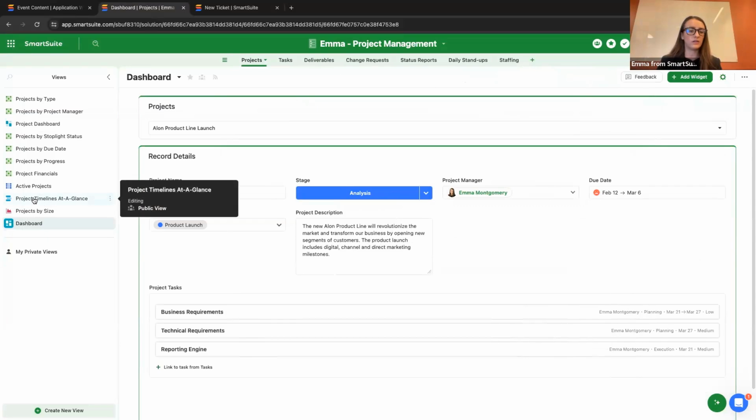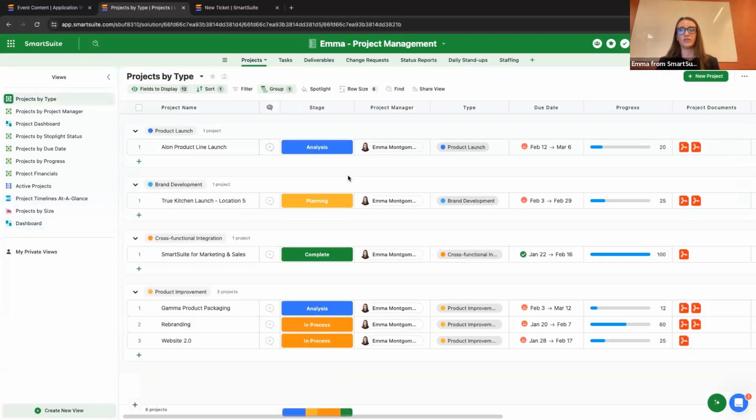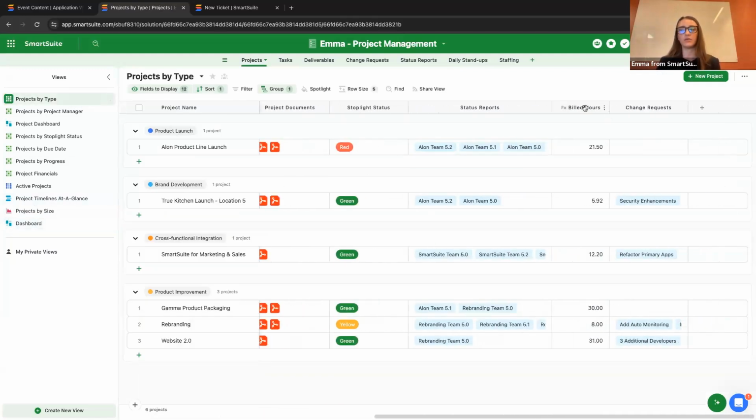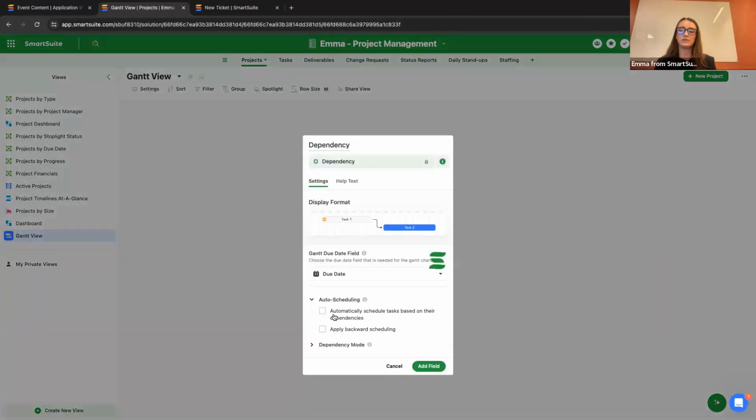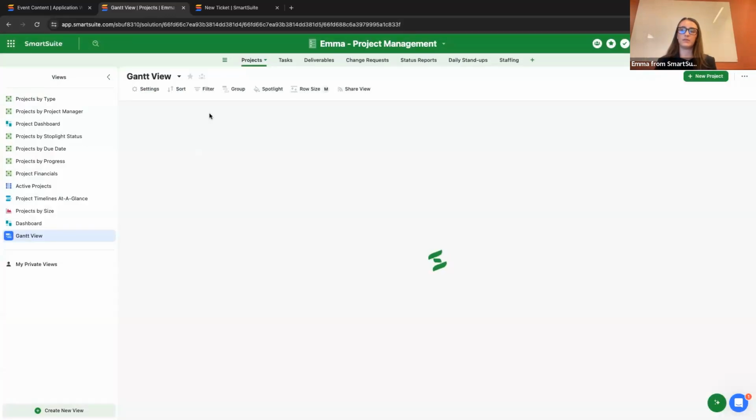So Gantt view, yes, you can have a Gantt view. Gantt views will be supported in dashboard shortly. But to visualize differences with the baseline, I think if there's a numerical value involved, you may not even need a Gantt view. Maybe it's just two comparisons. An example would be a project budget and how much each task is costing, so budget versus actual hours. A Gantt view is based on dependencies, so an example would be a task that depends on another to be completed for a project.